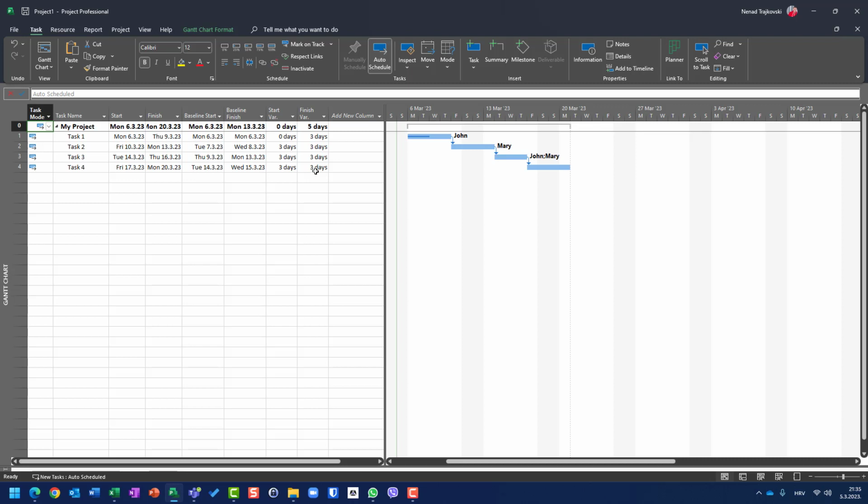If I have a schedule with hundreds of tasks and I save a baseline, let's say that I have 50 tasks, and from task 1 to task 50, I save a baseline and I have some variances. And afterwards, I want to add some task and I want to see the variance for that task in a way that I put in the baseline what it's supposed to be, finish date, start date, whatever, duration, and then calculate variances, I don't recommend that. Why? Because if you forgot a task, then this task, after you put it in the baseline, should be as it was when you created it.